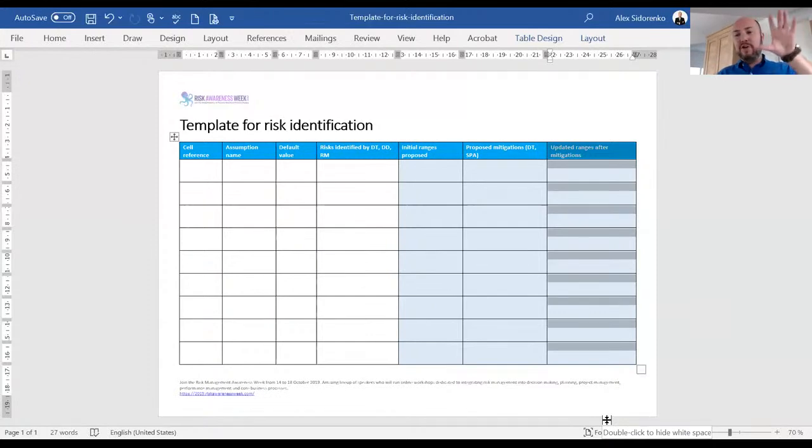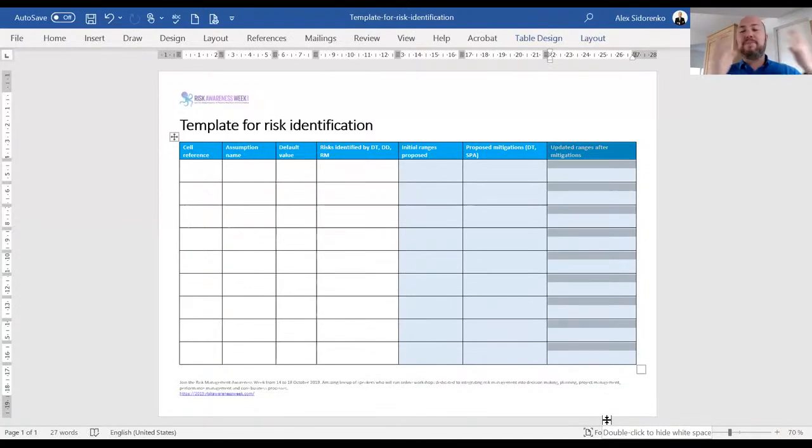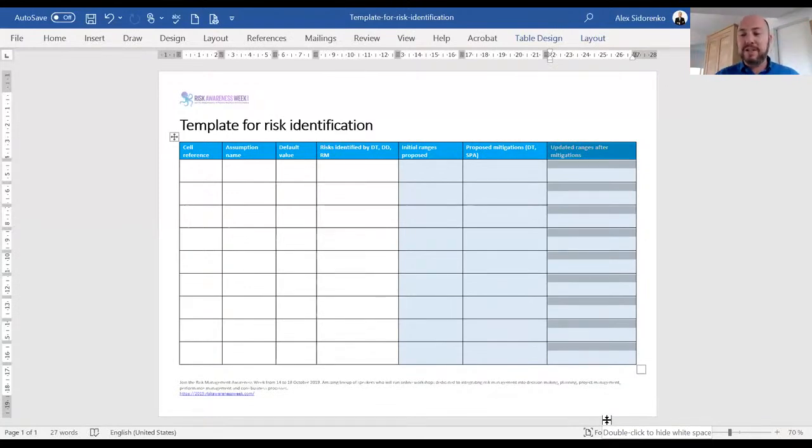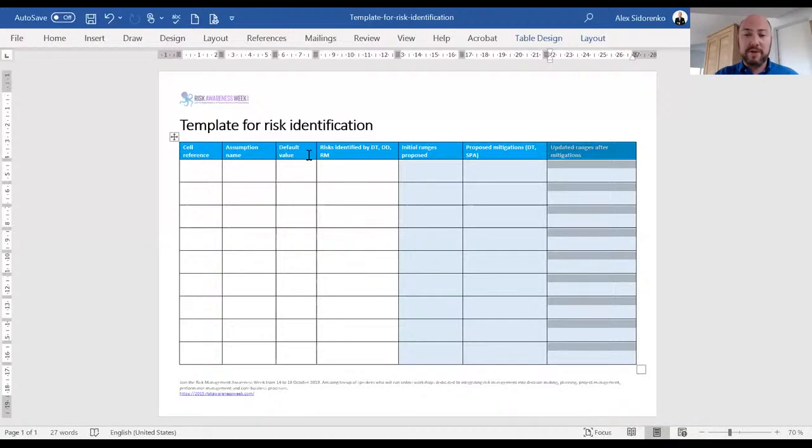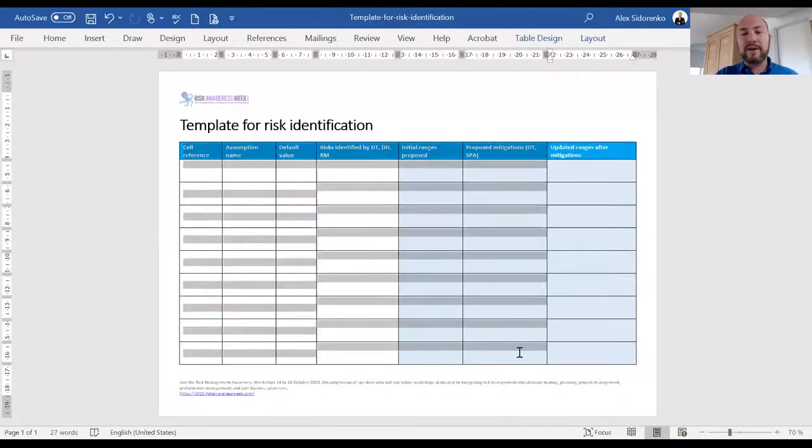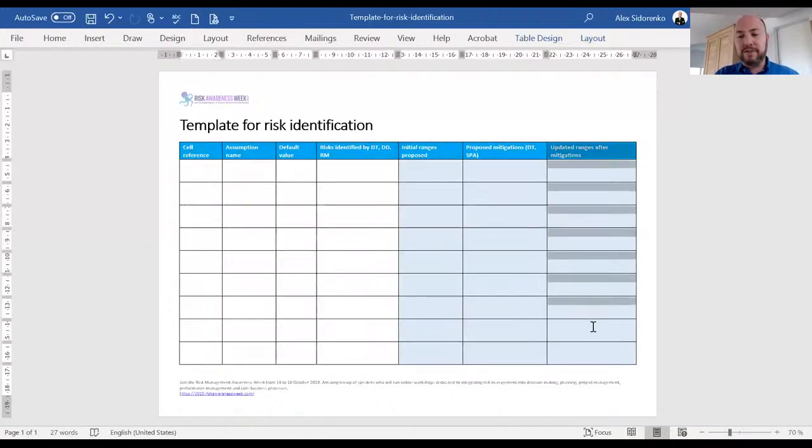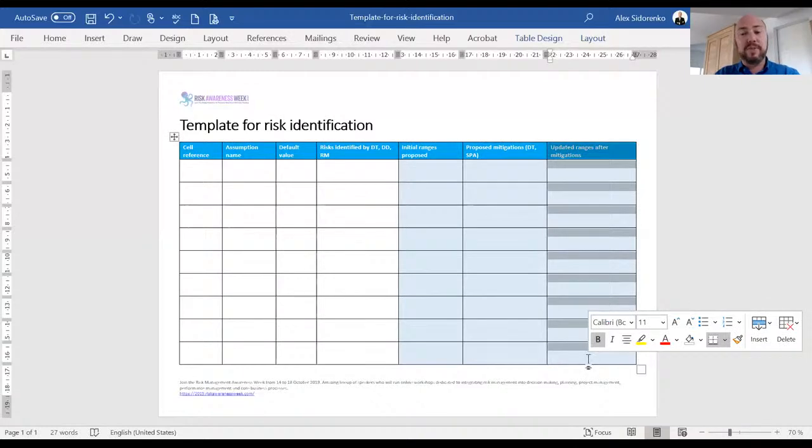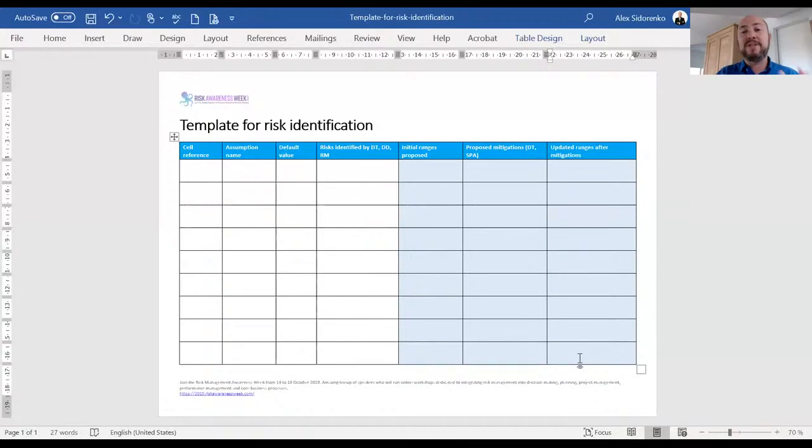Then we rerun the simulation. And now we have one simulation which is our initial risk exposure, and then the second one is our updated risk exposure. And that's the updated risk exposure that we want management and the decision makers to see and use for the actual decision making. Most of the work happens in the background with the actual team that prepared that decision, but then the final version finally gets to the decision makers.